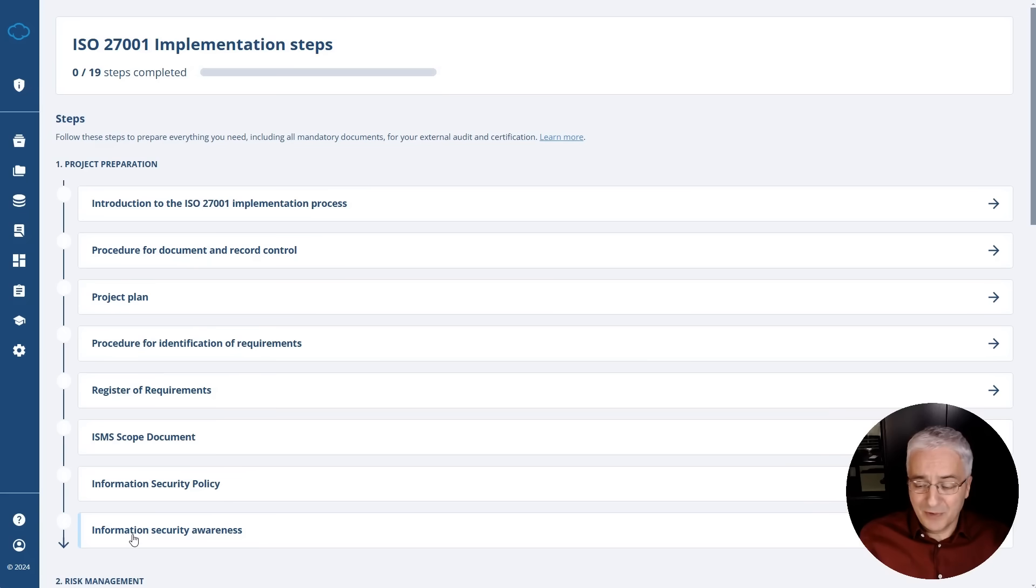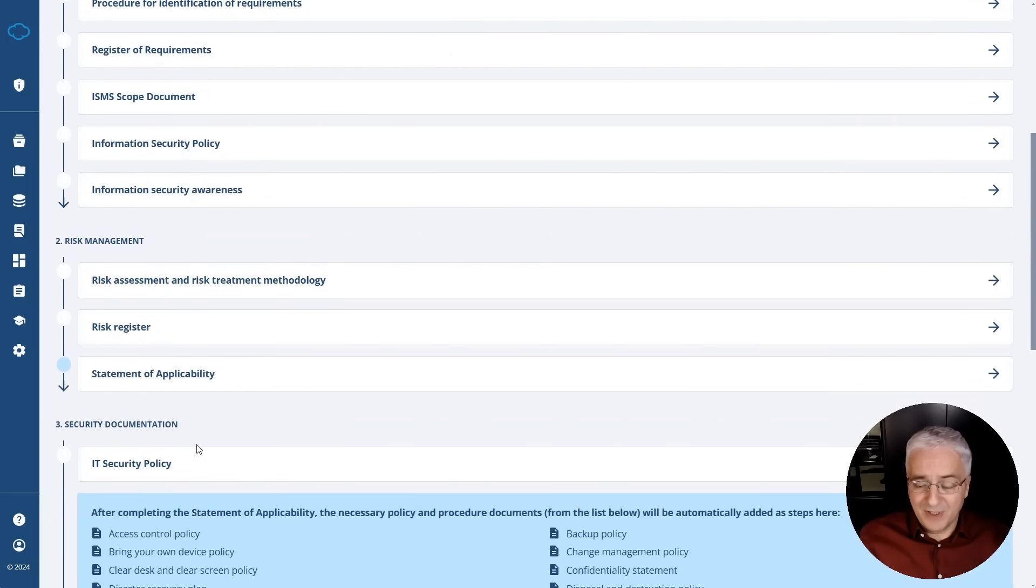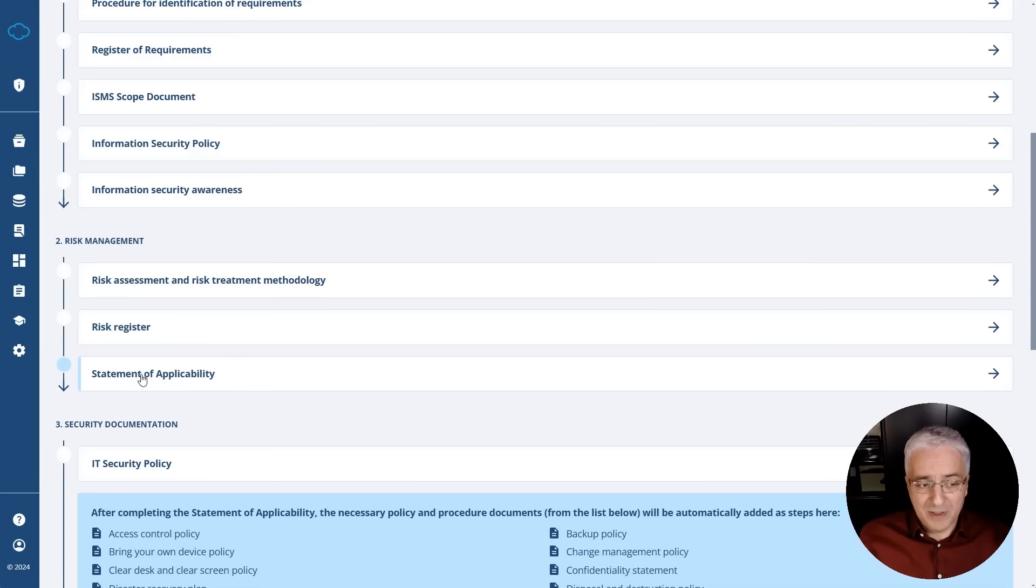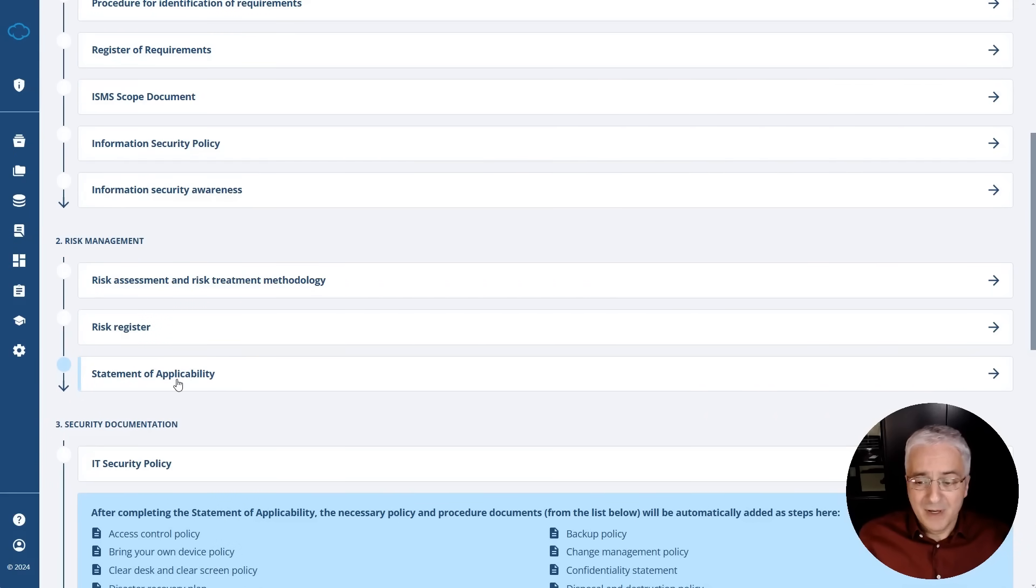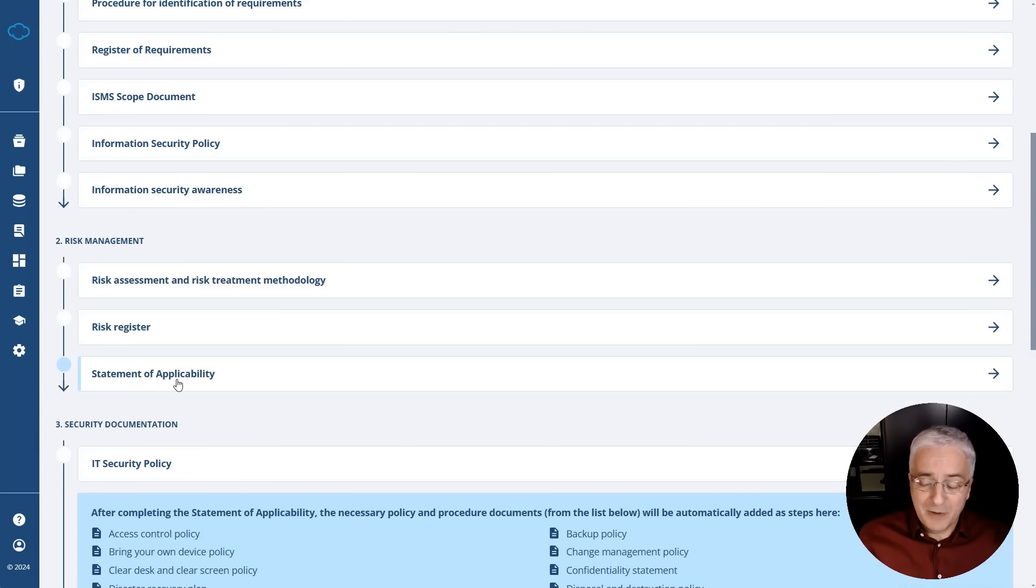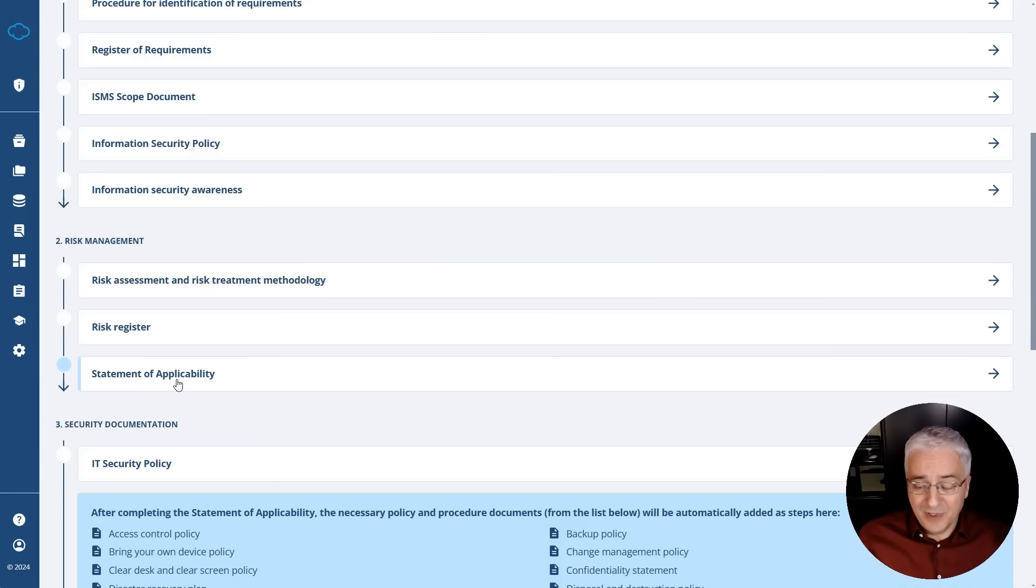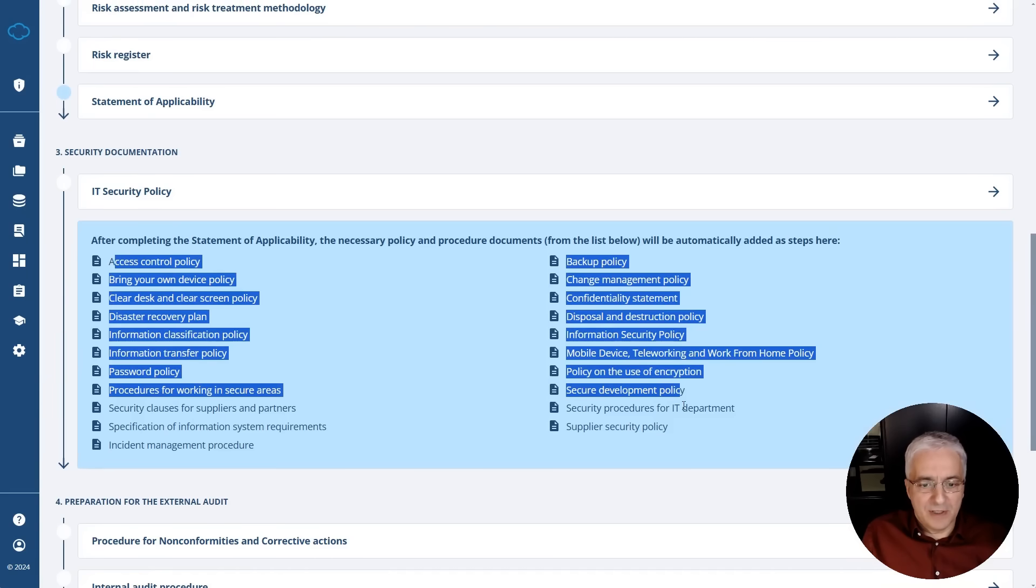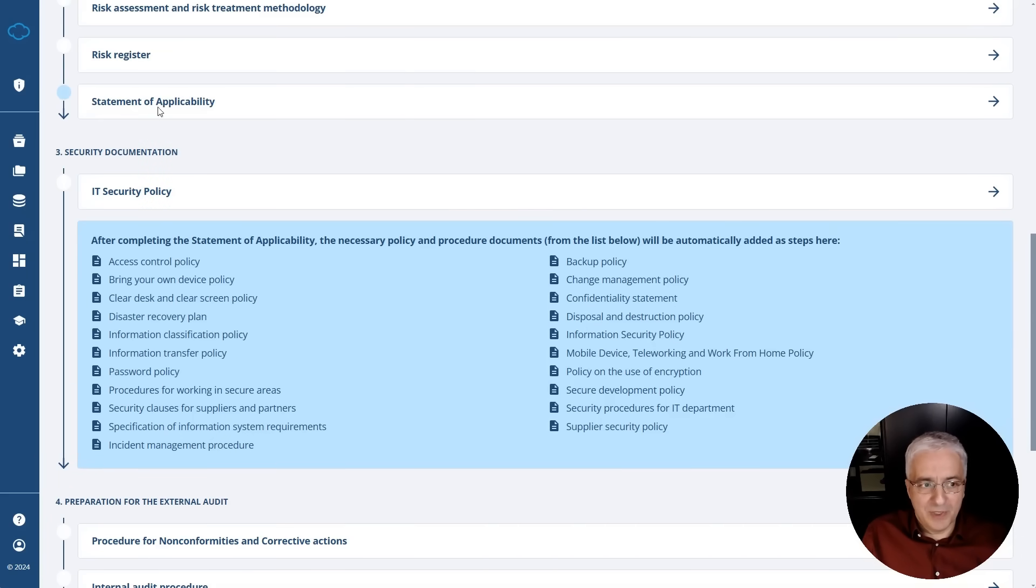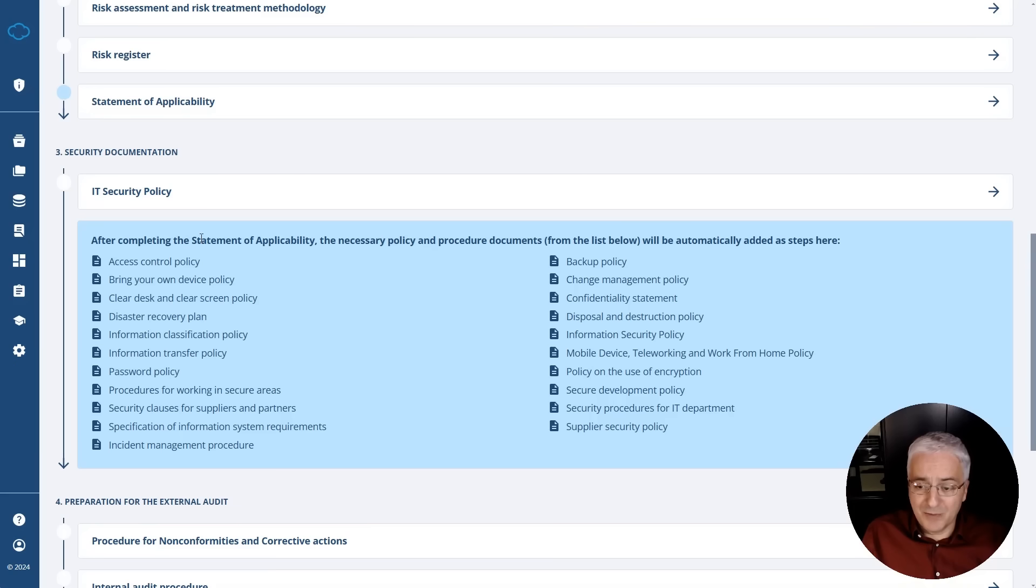the risk register and before you complete the register of requirements. But one of the most important things that you should really be careful about is this statement of applicability. You should not be doing this before you complete the risk register and before you complete the register of requirements. Because the two main inputs into statement of applicability are risks and requirements. And when you actually start working with Conformio, if you go directly to the statement of applicability, you will simply see an empty register if you didn't fill out these requirements and risks prior to this. And also these policies and procedures, basically you cannot start writing them before you complete the statement of applicability, because in the statement of applicability you make these decisions on which controls to apply, but also which documents to use to cover these controls. You can't really have these documents before you make the step of statement of applicability.